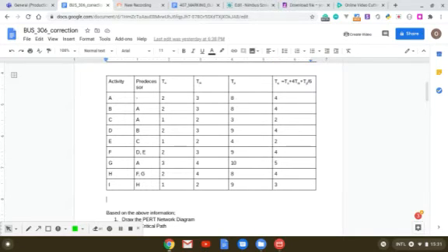Now, there's something we need to recognize here. What I'm going to start doing, I'm going to be using this A. This is activity A. The predecessor is none. There was nothing that starts there. There's no predecessor before activity A. And the time is 4. We're going to be using this time to draw our network diagram. We're not going to be using the other three times because you can't pick any one of them. There's no specific one you can pick out of these three. That was why we had to do this.